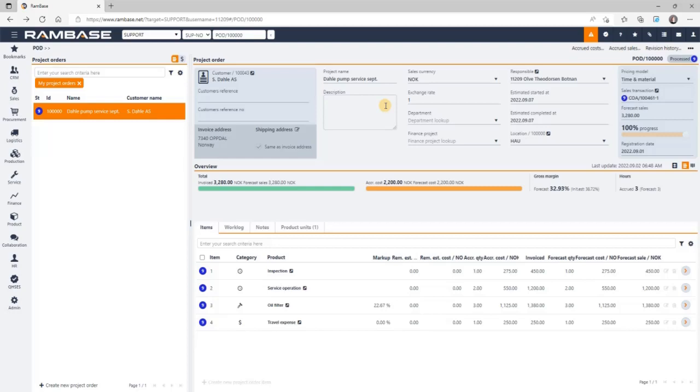When you select a project order item for material or expenses, it will be checked if there is any billing basis that has been accrued before the filtered date. If that is the case and there is no revenue left as remaining estimated or pending, all billing basis for this project order item will be invoiced. If there is revenue left as remaining estimated or pending, no invoice will be created for this project order item at all.